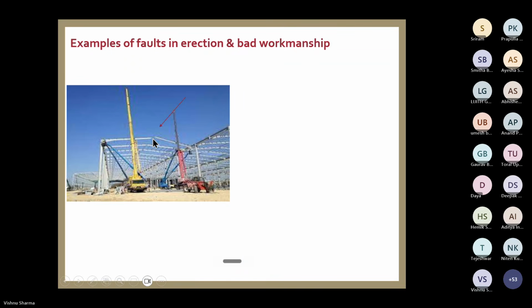But if the supervisor comes or the principal comes for inspection, he finds, what is this nonsense? It is not correctly executed. You dismantle this bar and again re-erect. So that cost, subsequent cost, rectification cost, they are not payable under the policy. Okay, this is faults in erection.